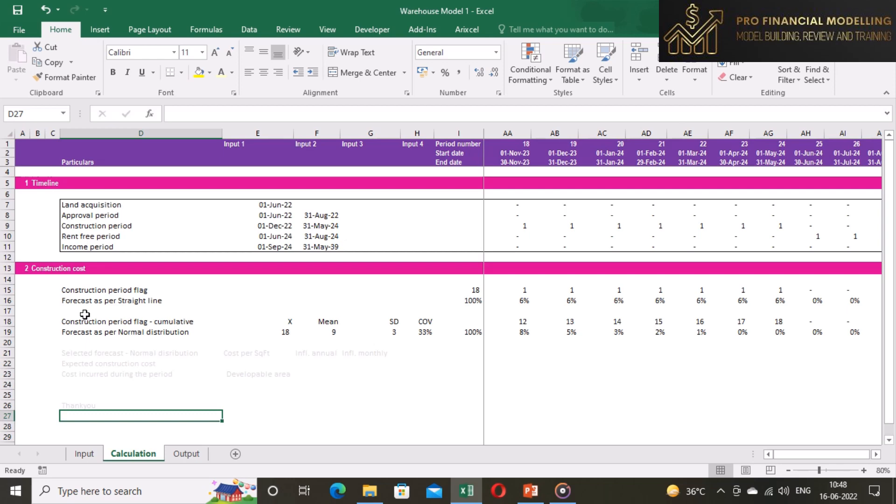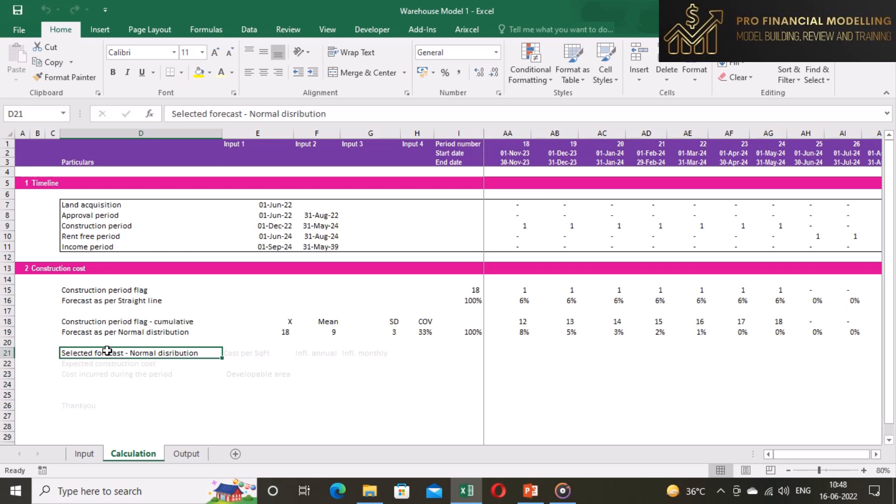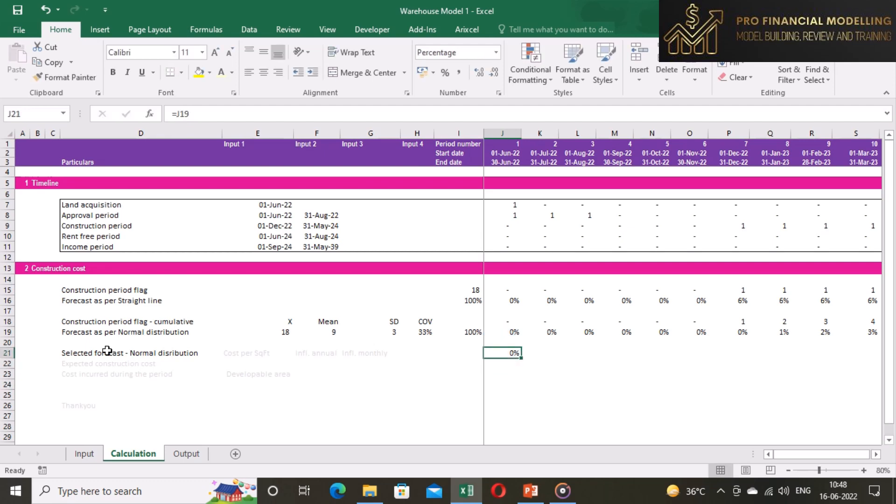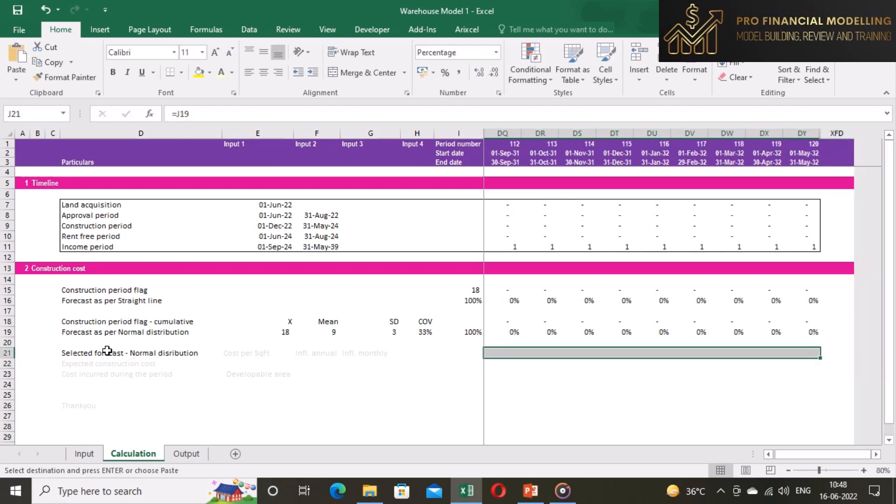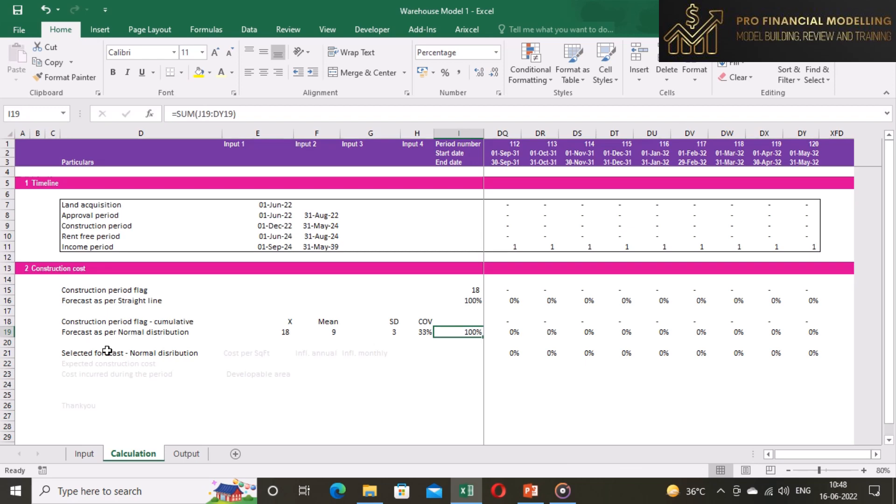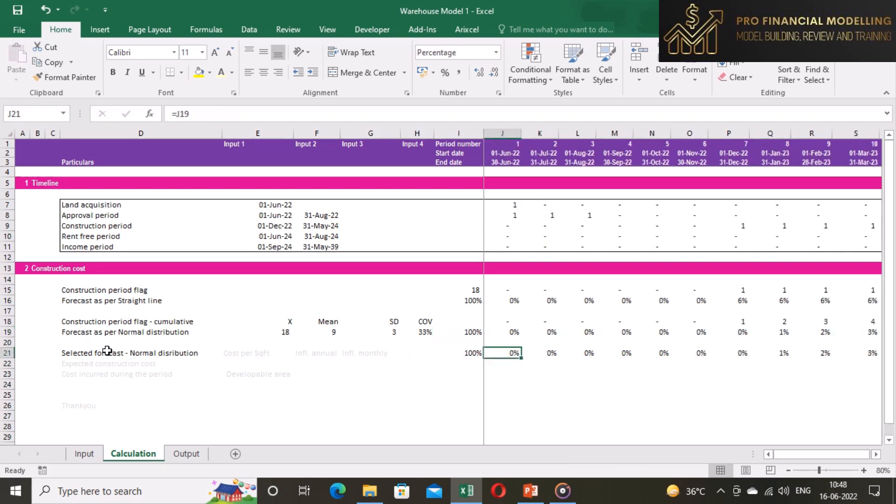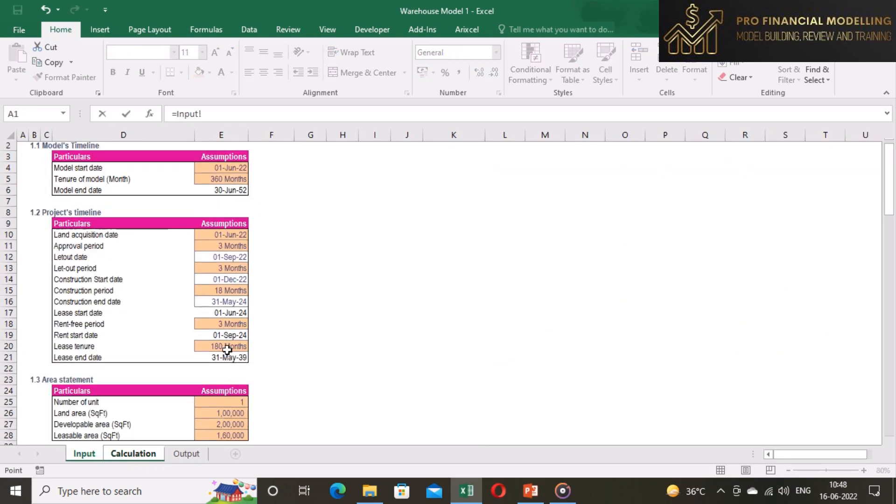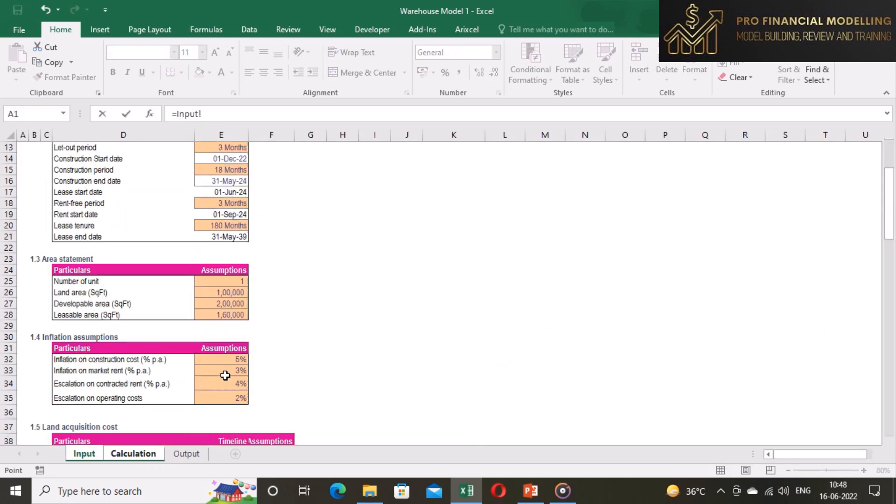To compute the construction cost during the period we need to select one of the forecasts done for construction cost. Generally, we prefer to choose normal distribution over straight line as it reflects the actual scenario of construction cycle.